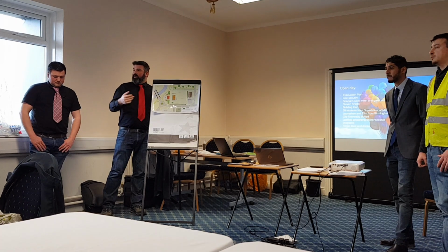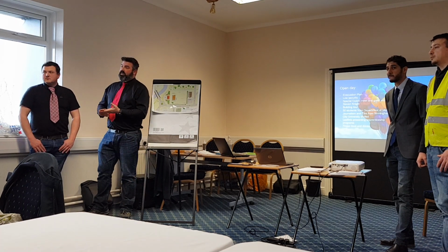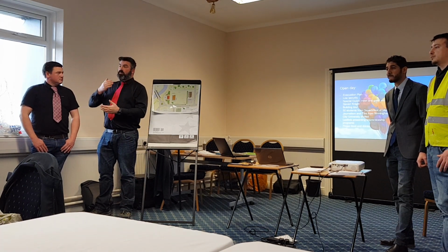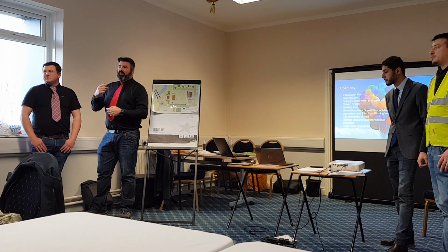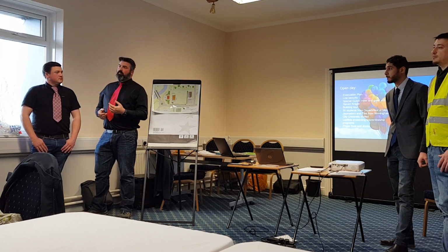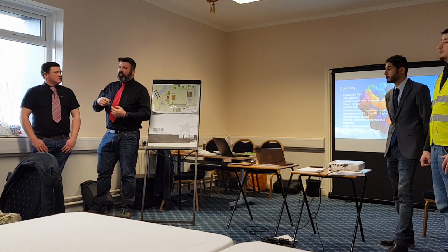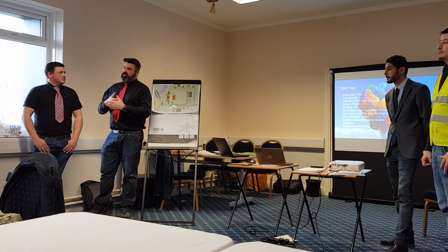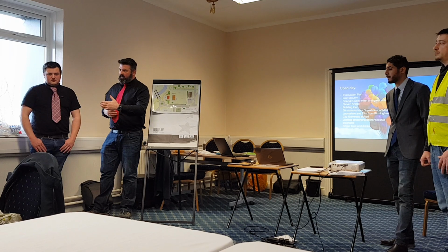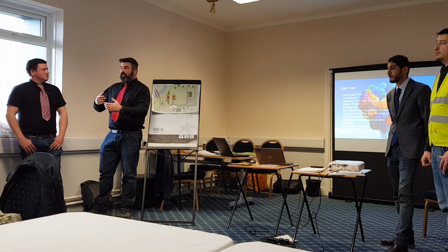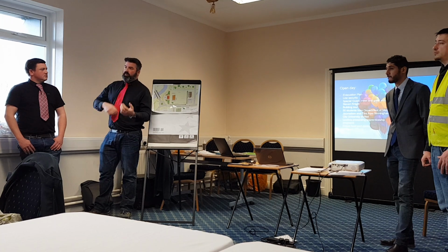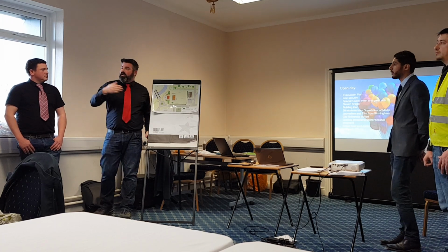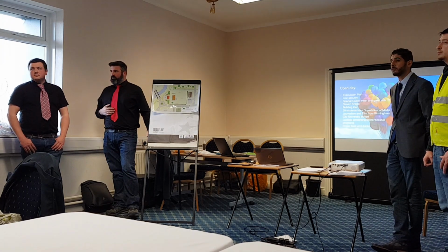We'll try to set up and regulate a timetable for deliveries. That can be very difficult, and it's something you have to adapt and manage on site as you go. But if the pack system is in place and they're sticking to it, that at least eliminates some issues of not having the right PPE, not knowing the right site address, or not knowing the system. So they know the system before they get there.